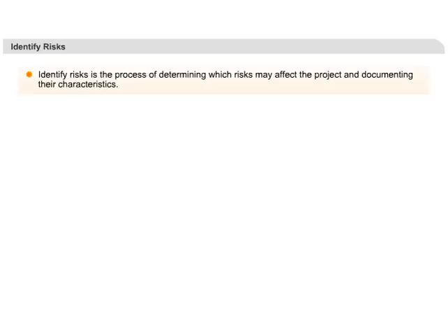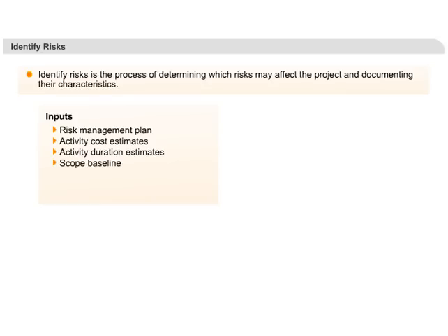Identify risks. Risk identification is an ongoing, iterative process. Risk can arise at any time during the project execution cycle. Even when the project is started, the customer or the project sponsor can inform the project manager about possible project risks. But generally, the project team should look for possible risks in the project management plan, project schedule, cost, and scope data.